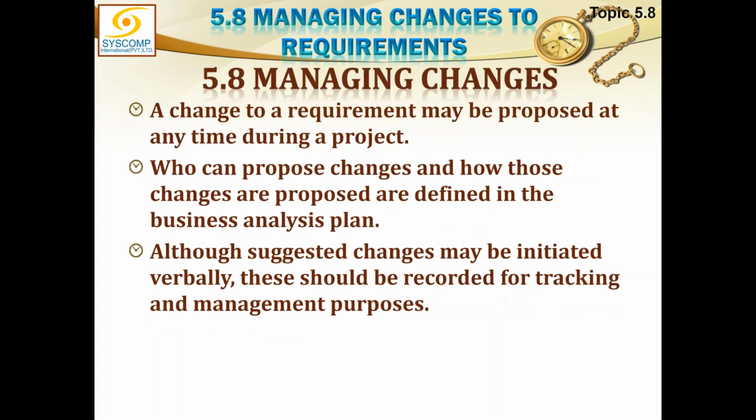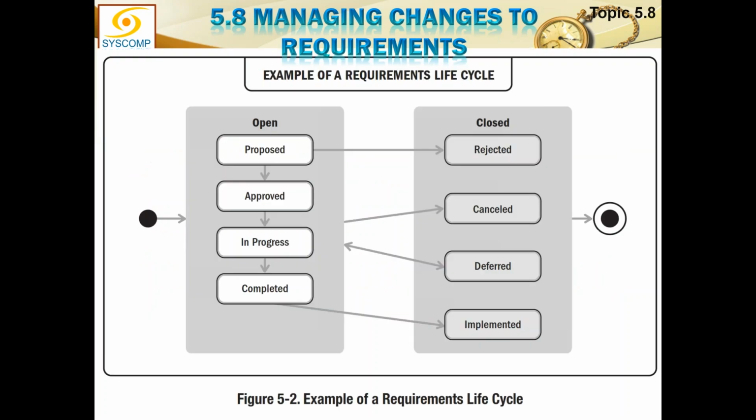Managing changes to requirements, 5.8. A change to a requirement may be proposed at any time during a project. This is completely open. Requirements can change any time during the life of the project. Who can propose these changes and how these changes are proposed are defined in the business analysis plan. Although suggested changes may be initiated verbally, these should be recorded for tracking and management purposes.